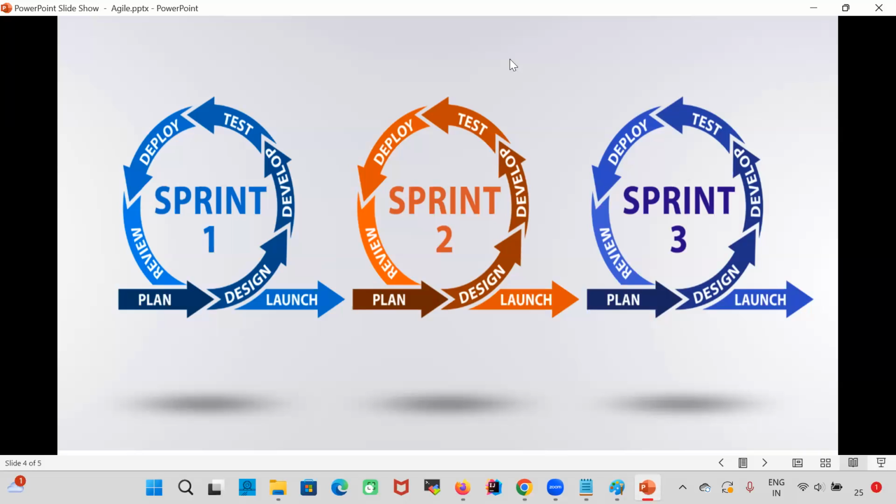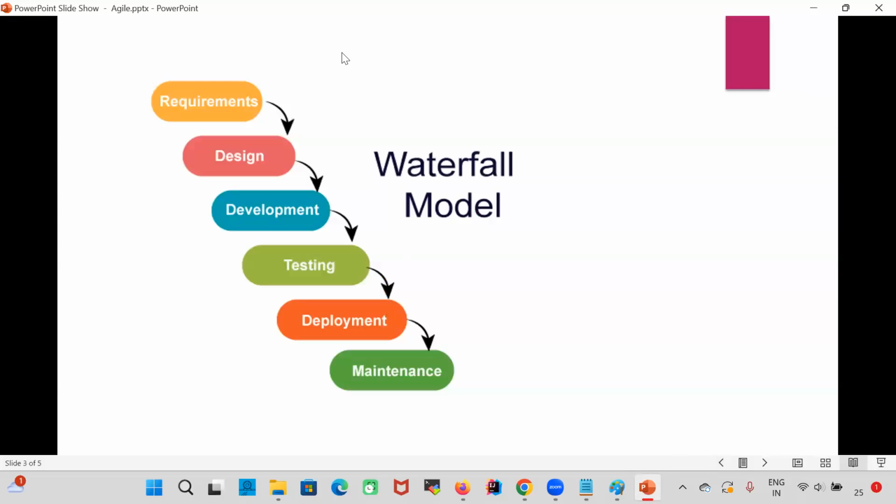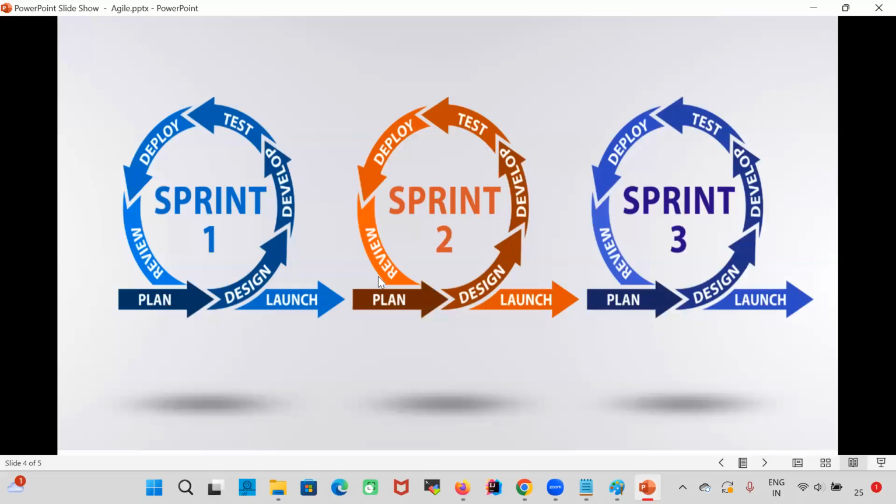As we are delivering the project to the client on every release, DevOps team involvement will be very high in the Agile methodology. Because earlier in the Waterfall methodology, the project will be developed, will be tested. At the end, delivery will be available. But in the Agile methodology, for every 2 months, we need to deliver the project. So continuous development and continuous deployments will be available in the project. That means the development team and operations team should work parallelly in order to deliver our application to the client with high quality. That's where DevOps became very popular in the market.